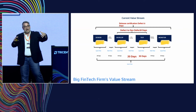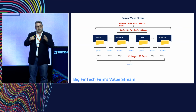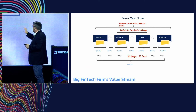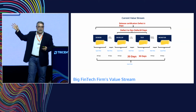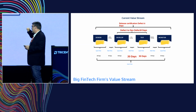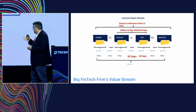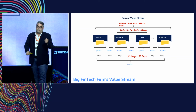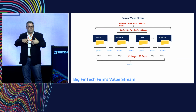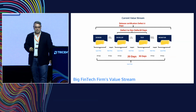So this is a value stream map. I put some lean principles in here, and I also put systems thinking in here. Not just measuring takt time or measuring cycle time, delivery time, and so on. I'm actually looking at how long those feedback loops take. And things started to look pretty interesting as I dug in. For example, 30 days for something to be in test. Thirty days? That tells me they're delivering too big of a package to test. Twenty days waiting on test. Well, why is that?